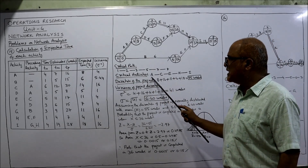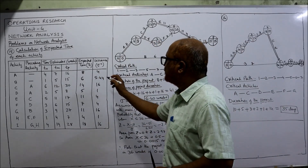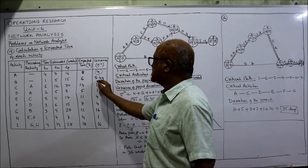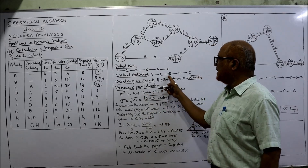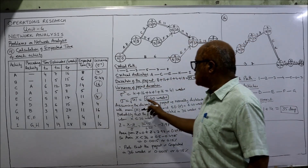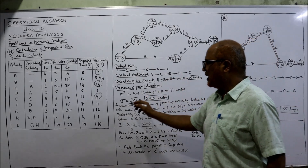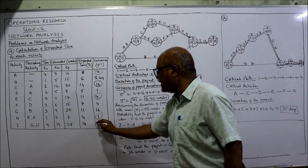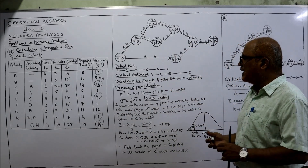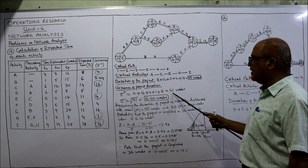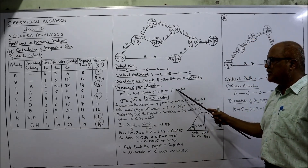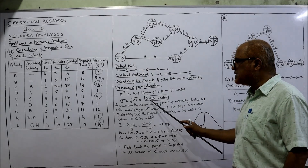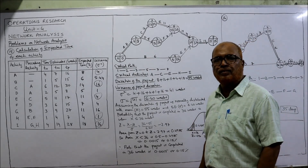For variance, we take the variances of the critical activities only. Variance of A = 4, variance of C = 16, variance of E = 4. Adding the variances of all critical activities (A, C, E, H, I) gives a total variance of 41 weeks. The standard deviation is the square root of the variance: √41 = 6.40 weeks.